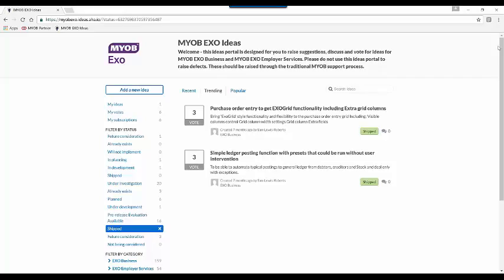Now this is fantastic because quite often people can't do this in a jobbing site. They can't accurately go at the end of a job and say it truly cost us this much, including the cost of your materials at the time, and we made this much of a profit. But not only at the end of the job can you do this with progress billing, it allows you to keep track of it all whilst the job is in progress. So for example, where you've got 4-year-long jobs, this is great because you could have quarterly reports running to show you where your progress invoicing is going and still capture the actuals on the job.